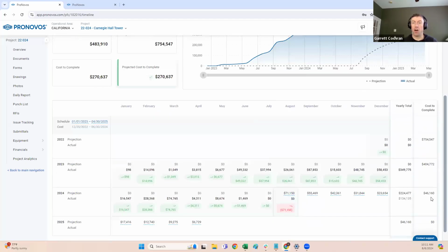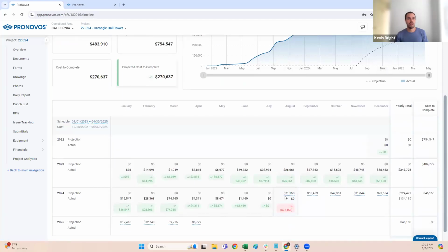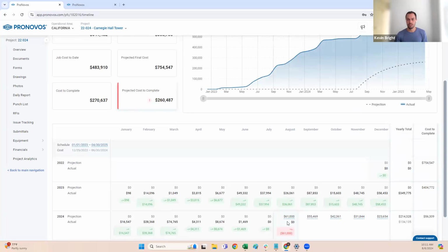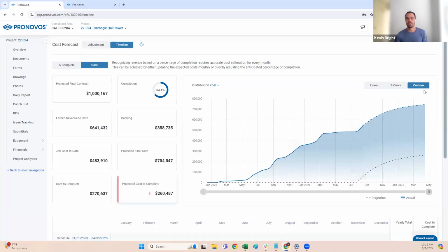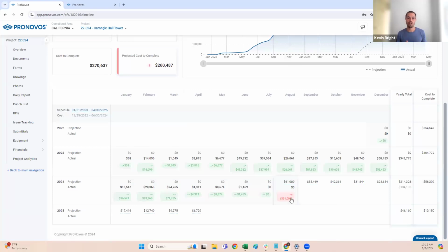Perfect. I love it. And I see there's a custom one. How do we go about utilizing that? Yeah, so the custom one is what you get if I come in here and modify any of these values. So if I say, all right, this is going to be 1,000, well, now this is no longer a standard S curve or standard linear, so it's going to switch over to the custom. The custom means you've gone in and modified what those standard curves are. Understood. Thank you.